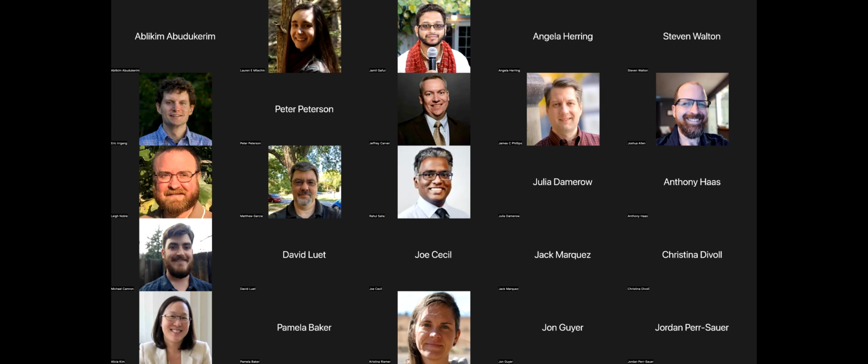So I have a lot of tricks. My sprint planning meetings are 2 hours, and we start with a discussion of what our sprint goals are going to be, and a lot of times that conversation can take longer than anything else. The Scrum Master really has to facilitate the meetings, and they have to be very good about helping people with their time. I have all kinds of techniques, like if people are talking too much, I'll break out an object that they have to hold if they're talking, and then they have to pass it, or I'll break out a timer, or any number of things to try to keep people on track. But it's the Scrum Master's job to facilitate the meeting.